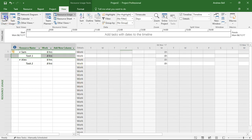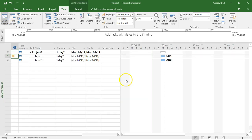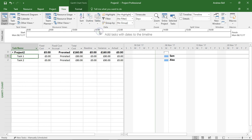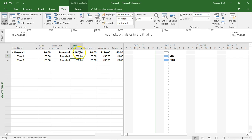So I'm going to go back to the Gantt chart view because it's familiar, and I'm changing the table to the cost table. We can see that because there was eight hours of work on these tasks at ten pounds an hour, eight hours is the default, the total cost of this project is £160.